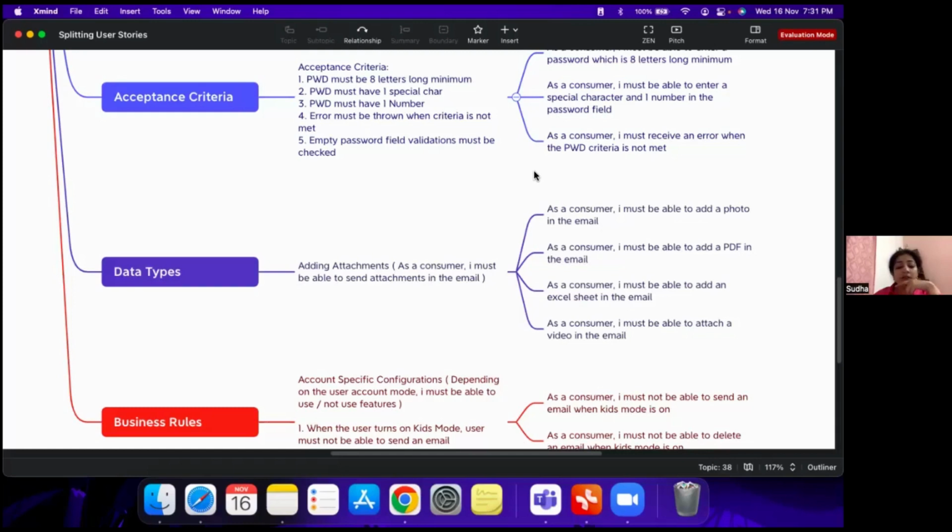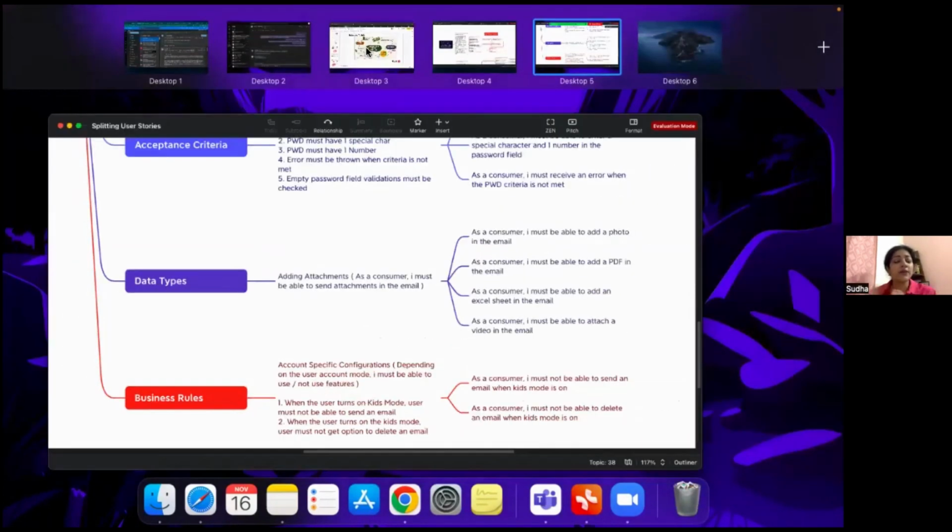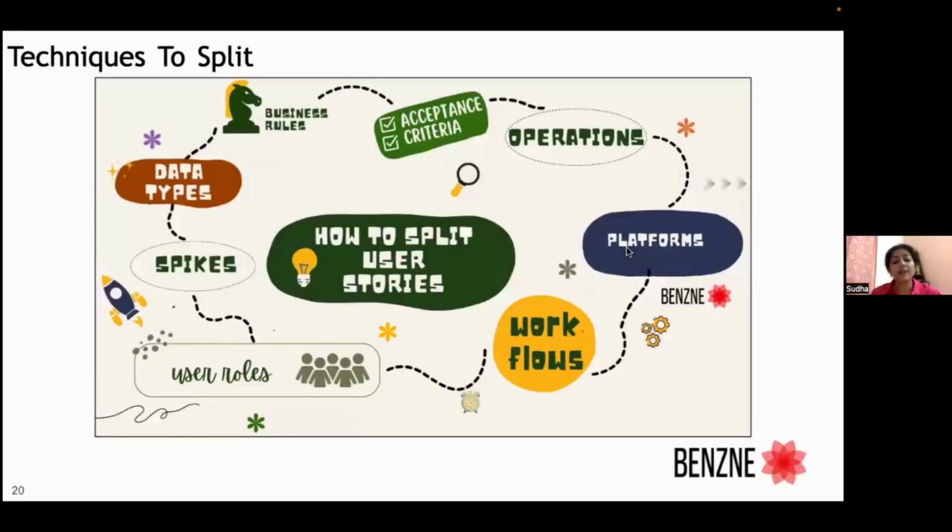I think to add to what Sujit said, Omi, it's all about just-in-time planning. Agile is all about just-in-time planning. You do a discovery as a product owner along with your product team and your team members, and you would have placed high-level placeholders for the user stories. Now, do you want to break down all the stories right there with the product owner? I don't think that's the right time, because you don't want to take every story which is part of the journey and break it down. The best thing at that point, in sprint zero, would be to take up those stories as a product owner, prioritize them, take the stories that are going into the first and second sprint backlog, and then figure out with the team whether they are big. If they are big, go about splitting them.